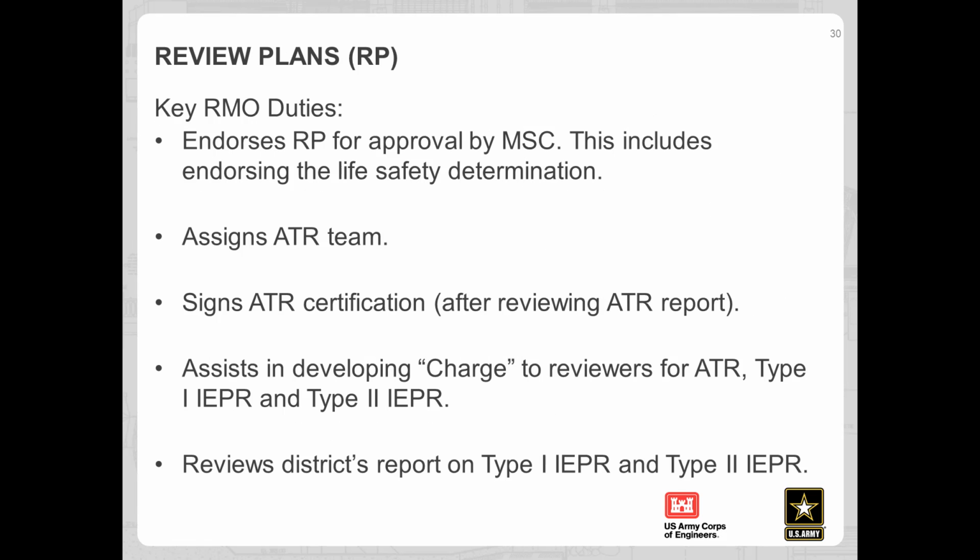So what does the RMO do? They endorse your review plan, including the life safety determination, assign your review team, and assign your ATR certification after looking at the ATR review report. They can help develop the charge for the ATR, the different reviews, external peer reviews, and review the report that comes in from the Type 1 or Type 2 IEPR.